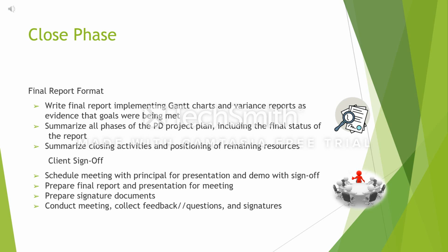Client sign-off checklist. Schedule meetings with the principal for presentation and demo with sign-off. Prepare final report and presentation for the meeting. Prepare signature documents. Conduct meetings. Collect feedback, questions, and signatures.